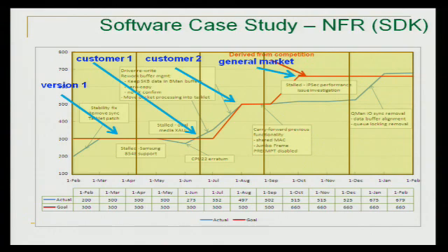So what this is showing is that you set a goal for where you need to be. That's the requirement. You can set a plan for how you're going to get there, especially if you're doing an agile project, because you're not going to get there immediately in some of these non-functional requirements. Reliability and others follow a similar path. But you map it out, plan it, and measure it so you know.